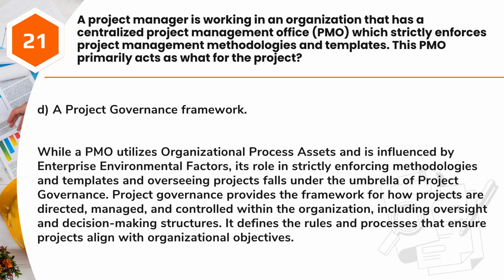Answer: D. A project governance framework. While a PMO utilizes organizational process assets and is influenced by enterprise environmental factors, its role in strictly enforcing methodologies and templates and overseeing projects falls under the umbrella of project governance. Project governance provides the framework for how projects are directed, managed, and controlled within the organization, including oversight and decision-making structures. It defines the rules and processes that ensure projects align with organizational objectives.